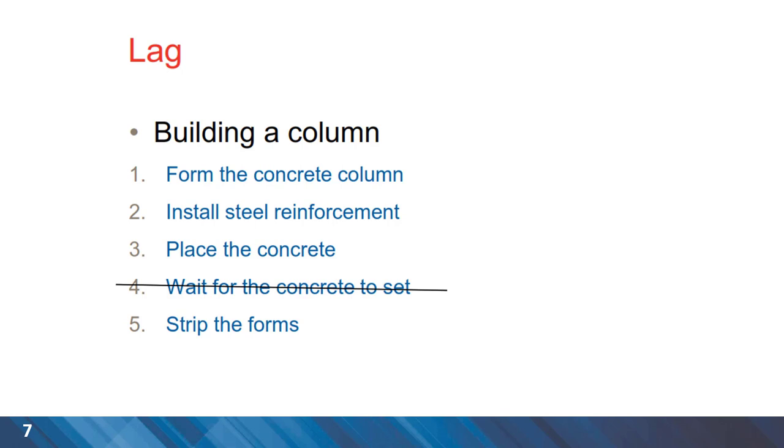The important point about activity four is that it's just a wait and no resource is required to complete that. So instead of an activity, we should call the fourth item here a lag.